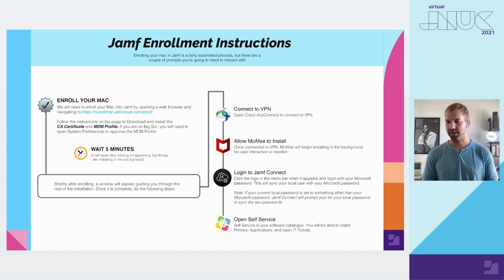Absolutely. Thanks, Shanda. I'll probably have to go quickly through these next couple of slides, but yes, as Shanda said, we had to spend a lot of time on these workshops. I think for 250 users, we ran about 35 workshops, and they were an hour long. So when she says pay now or pay later, if you pay later, you're paying with dividends. We probably didn't need to do that much work, but the users didn't trust this platform, so we needed to work with them individually for them to trust it. But yeah, I set up a VM, I screen shared, and I walked them through the Jamf enrollment, even though it was a zero-touch provisioning workflow, because we wanted to give the users confidence that this was going to work.